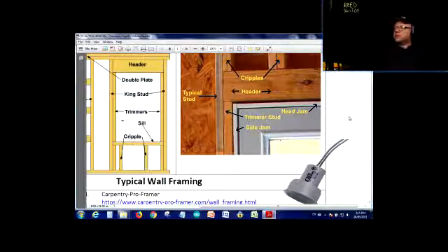Now, the best time for a security system or alarm system to be installed in a construction like this is before the drywall goes on. So that's a window of opportunity, and that has to do with project coordination. When you are coordinating a project, you need to consider certain things like coordinating with the general contractor: when is the drywall coming on, when are the air ducts going in.